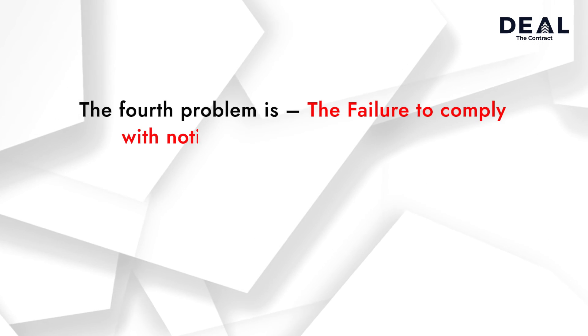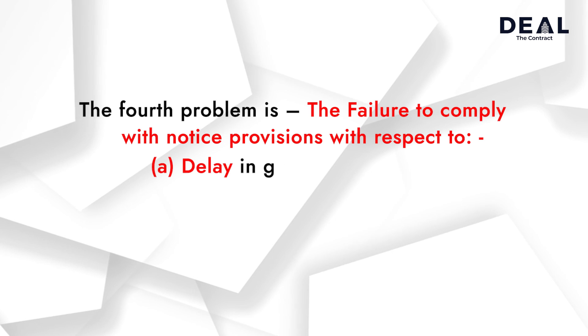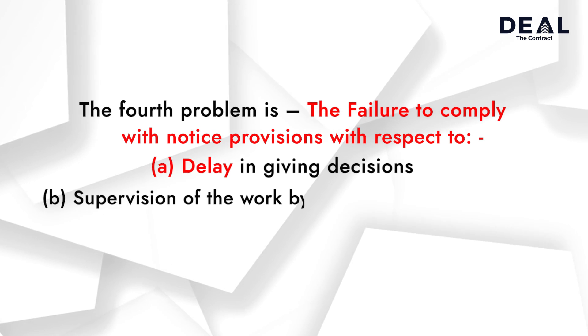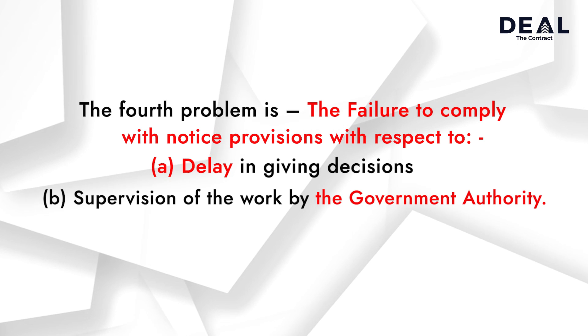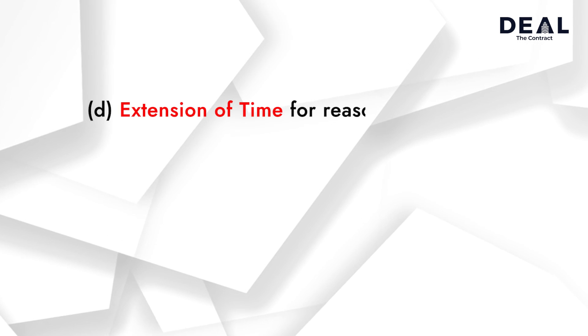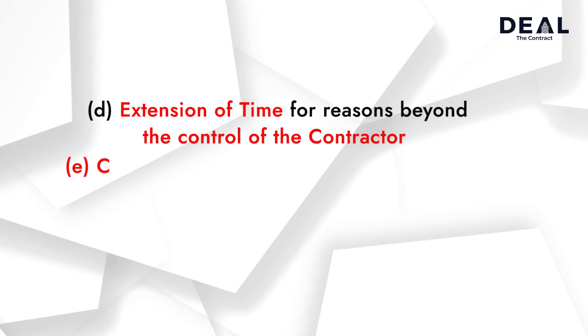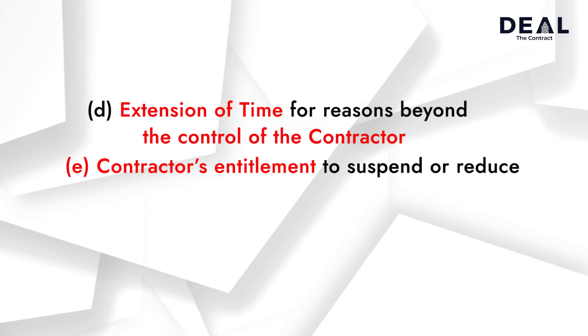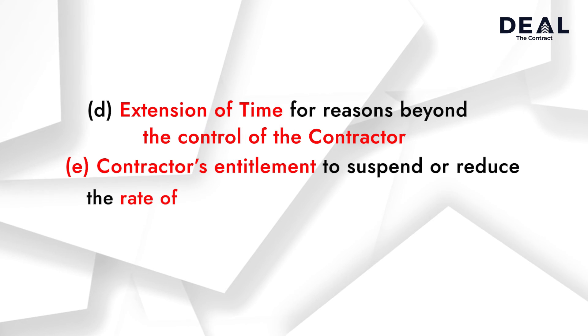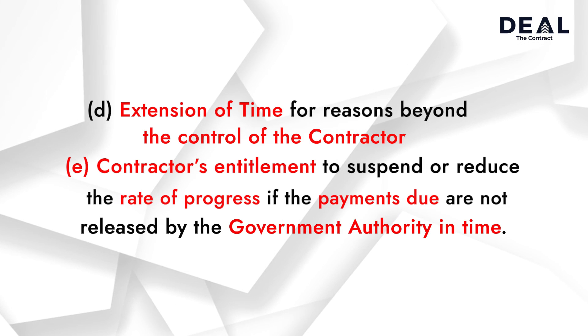The fourth problem is the failure to comply with notice provisions with respect to: a) delay in giving decisions, b) supervision of work by the government authority, c) failure to give possession of site, d) extension of time for reasons beyond the control of the contractor, and e) the contractor's entitlement to suspend or reduce the rate of progress if payments due are not released by the government authority in time.